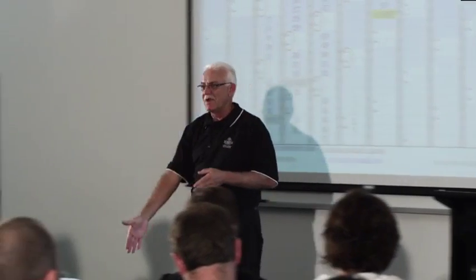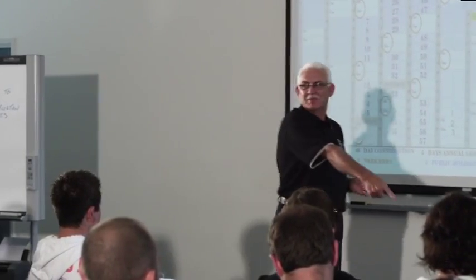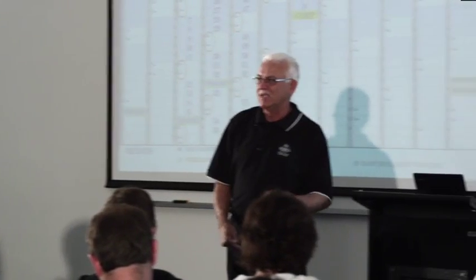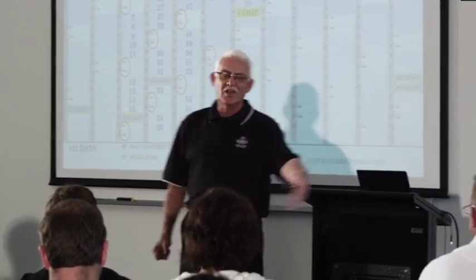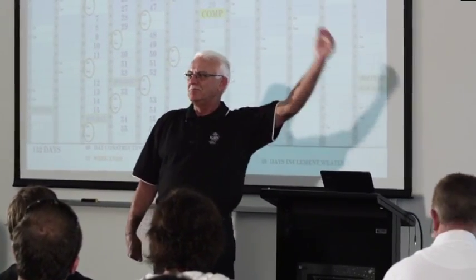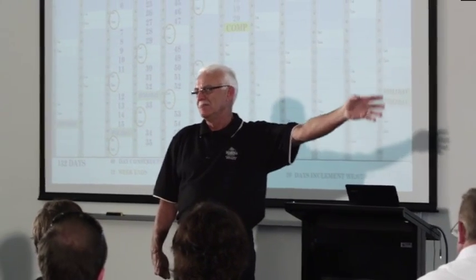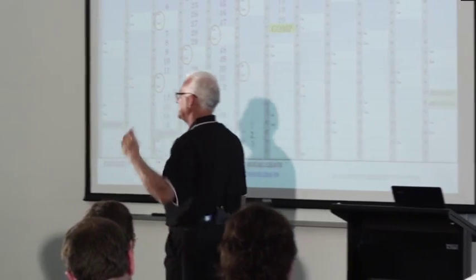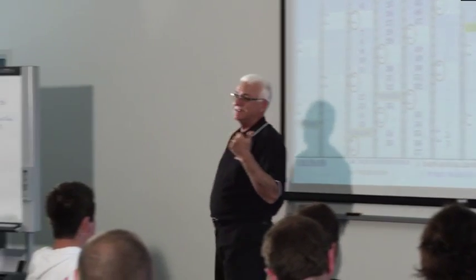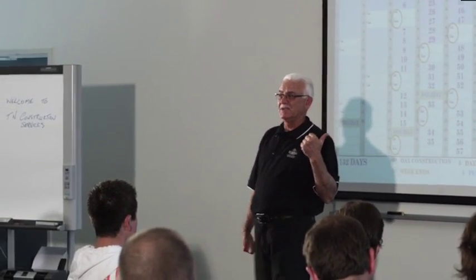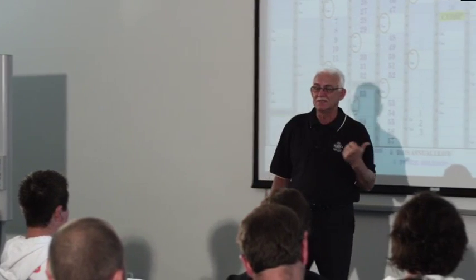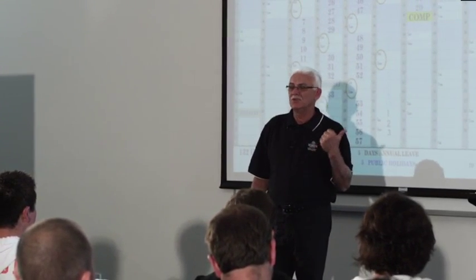If it starts raining today and doesn't finish for a month's time, and then you can't get on site for another 3 weeks, don't wait until after that before you put your time extension claim in, because your owner doesn't want to get shocked like that. All of a sudden you're going to hit him for an extension of time of another 6 weeks. That could be a dispute.